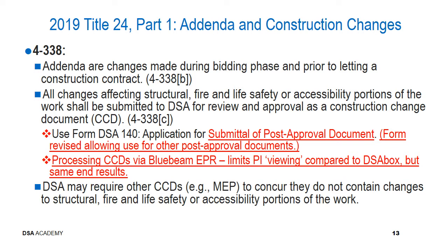Additionally, the method by which DSA is processing CCDs, given that we are now in the electronic plan review era, we have been using that to process CCDs. What you may find as inspectors is that this limits some of your reviewing ability of the CCD during the back and forth process that sometimes occurs between design professionals and DSA, but the end result is the same. The final approved CCD will still be uploaded to DSAbox as it has been in the past.